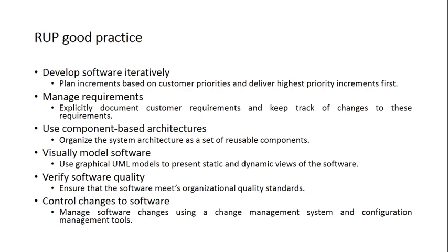Control changes means that we know in the SRS we make changes now and then. Designers can make a change, coders can make a change in the SRS, analysts can also make a change. Now let's assume that everyone is making a change in their private copy of that document, but others are not aware of it. They are using the previous version, they are working according to it, and once the work is completed and we combine it, a few people have worked on the previous version while a few others have worked on the later version. So at the end, when you integrate them together, it will give an error.